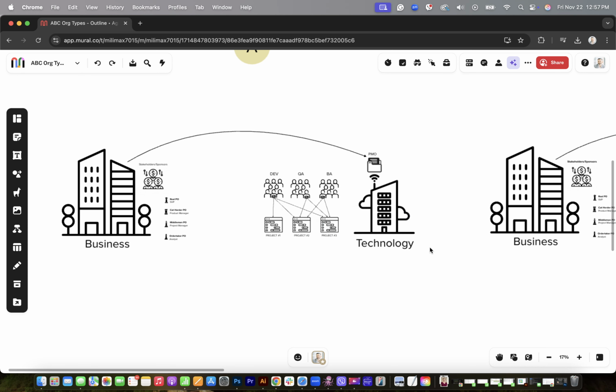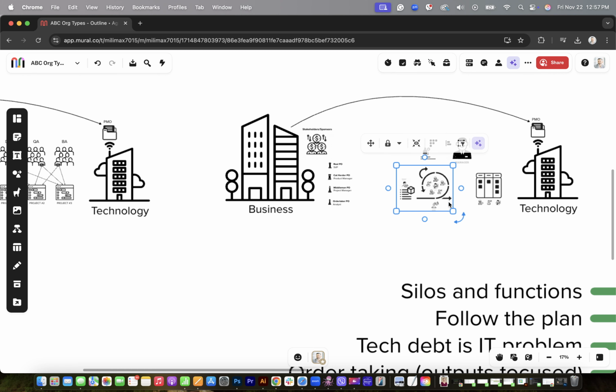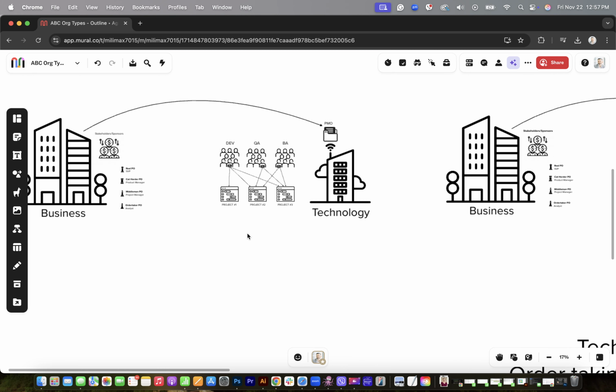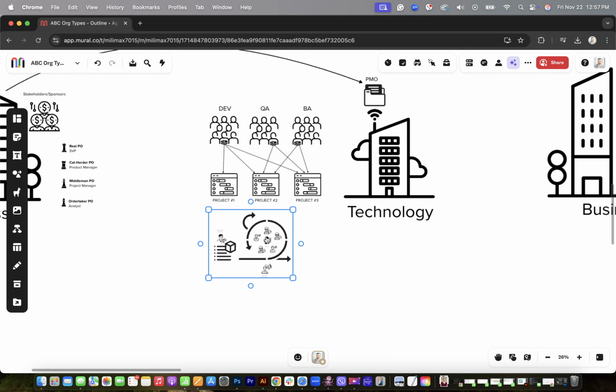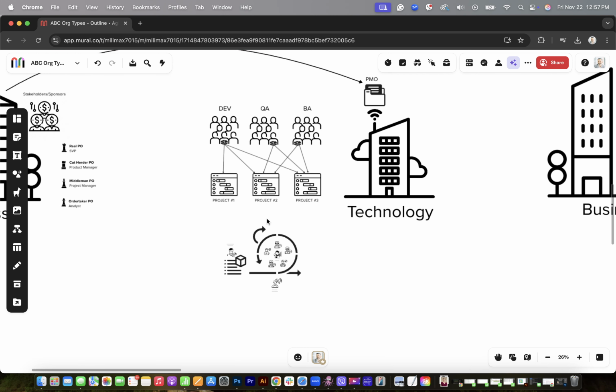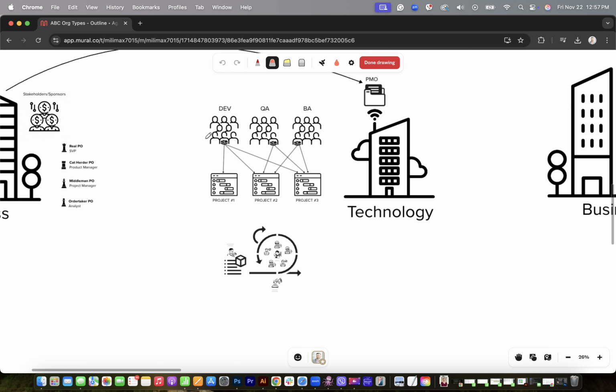Essentially, they'll just create a Scrum team, and they say, okay, we're going to do this project using the Scrum framework. We might get a few developers, a few QA, some BA. We might tell our project manager, who usually comes from the PMO, to be the Scrum Master. Essentially, you're not changing the structure, you're just laying the Scrum framework on top of already existing structures.